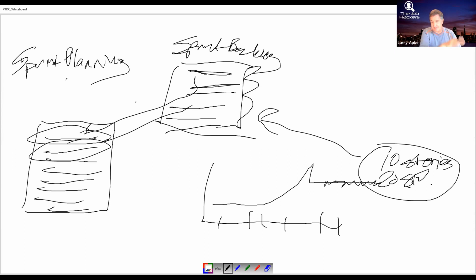As we're saying, look, we've got these 10 stories, it's represented by 20 points, whatever. We believe with a certain level of conviction or confidence that we can complete every single thing on that backlog in the 2-week time, or whatever your sprint length is, right? And I'll say 1 to 5. If they put a bunch of 1s and 2s or 3s, I'm going to say, hey, there's something wrong with this plan. We need to kick something out, right? Something doesn't belong in here. If I get all 5s, I might question, maybe we want to look at putting some more in, don't know. Maybe not.